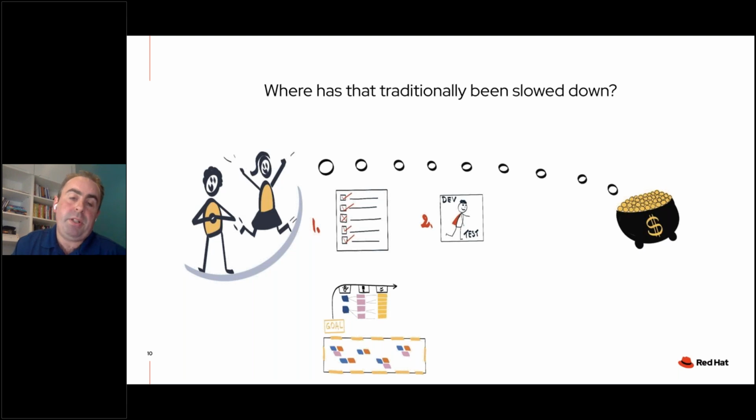Our second gap is about how we get that big long list of things built and delivered in a technology solution. And this is when our superheroes of the world, our developers and our testers, come into play. Now, in traditional software development, this was often a waterfall process where we take a signed off version of that list of requirements and we go through a period of designing a solution, and maybe different levels of design and signing off against those so that we comply against a set of requirements. And only when that's signed off do we start writing code and delivering software artifacts. And when that's all finished and everyone's done their coding, then we start some testing. And then finally, we move towards deploying to production.